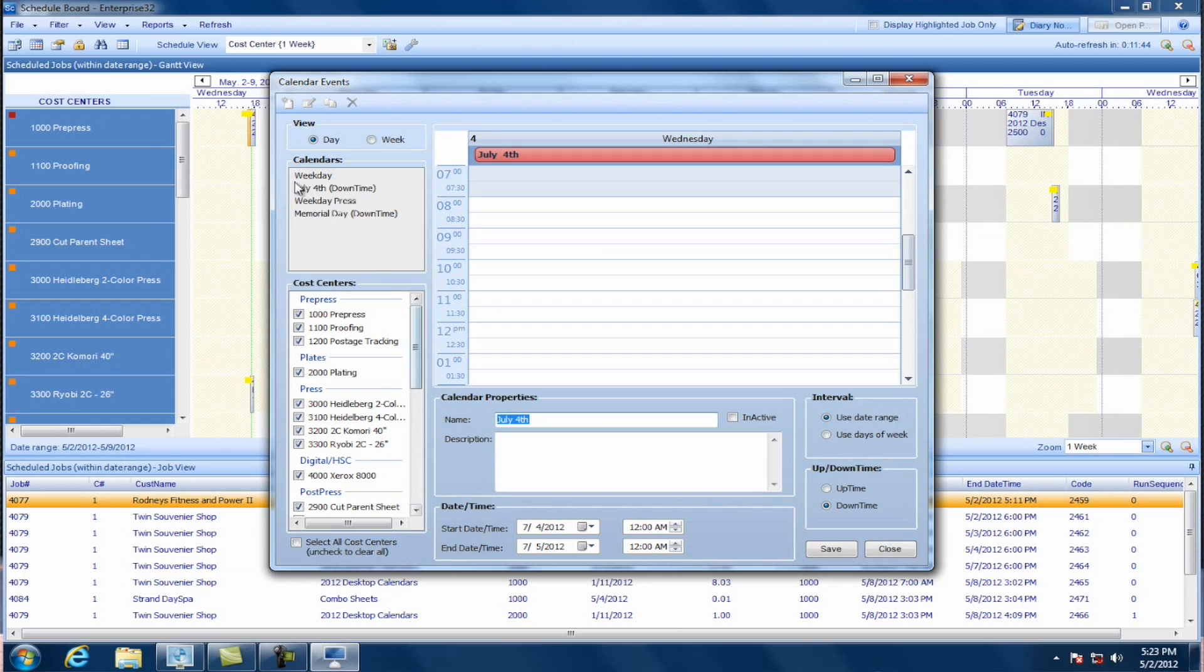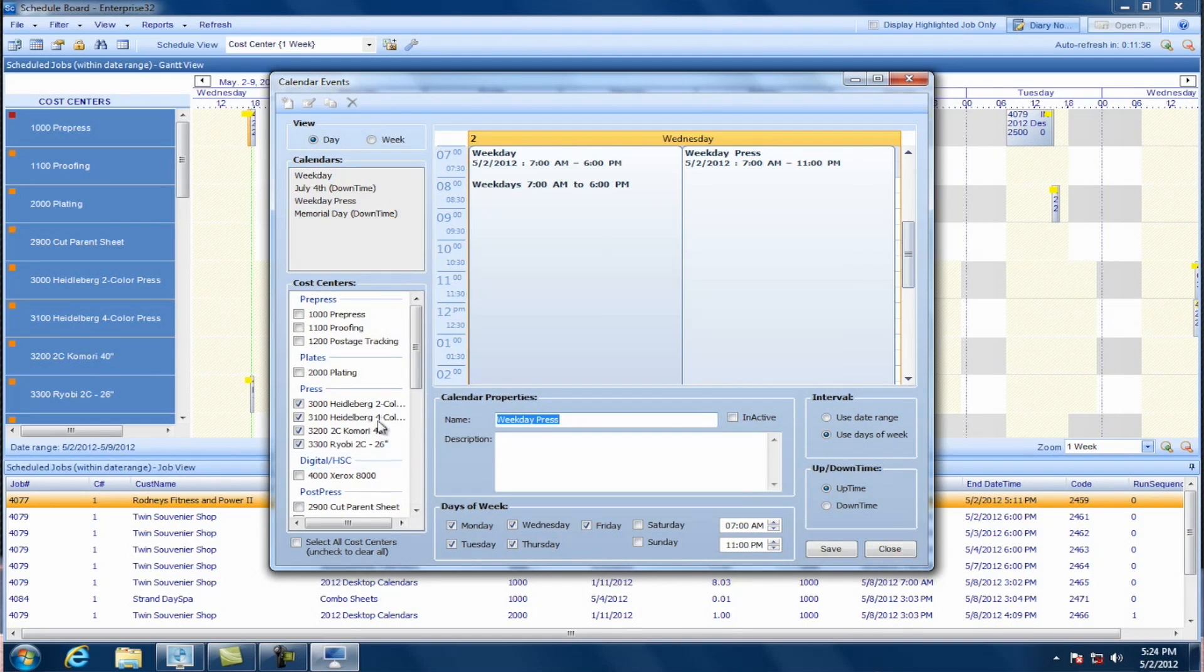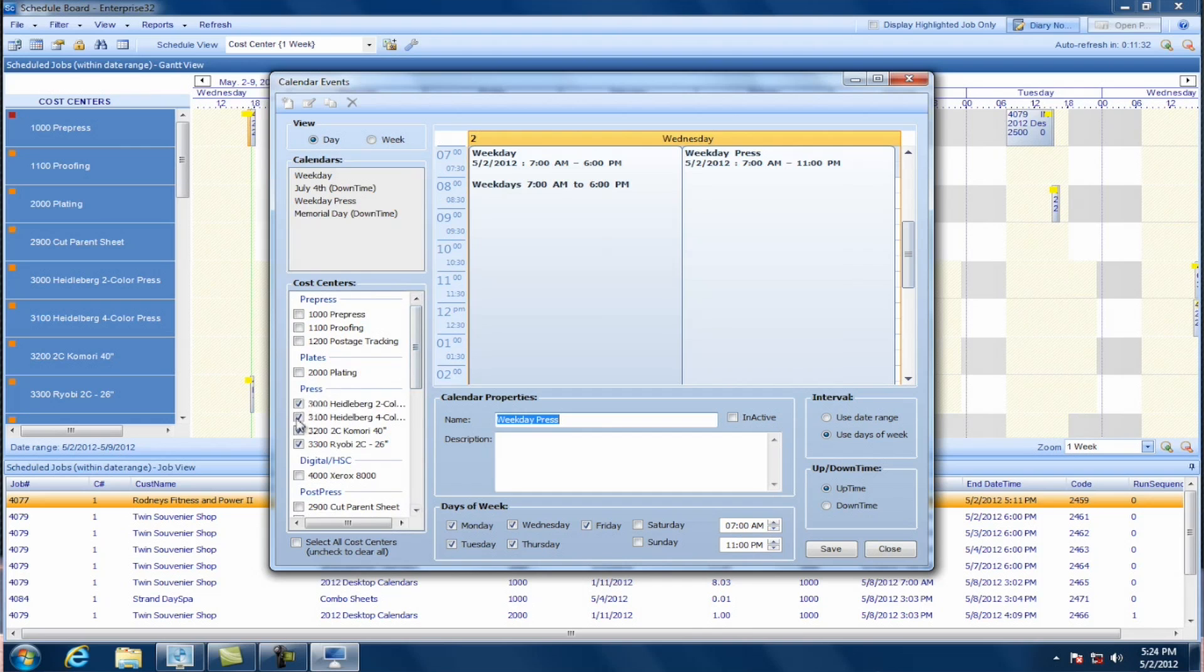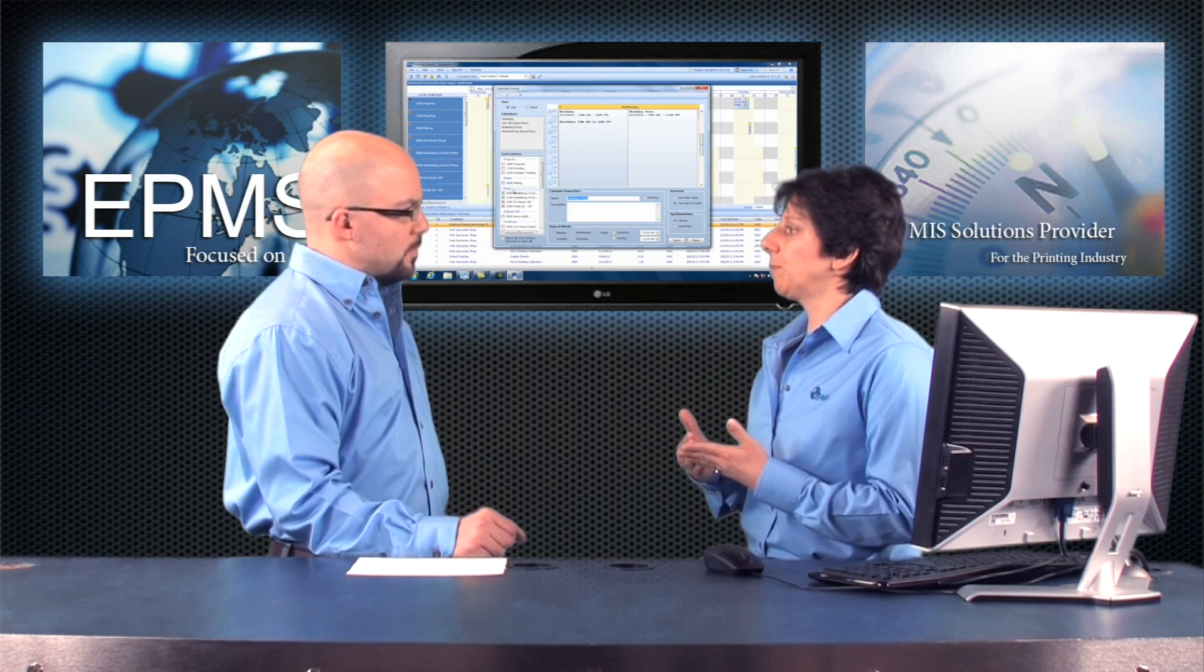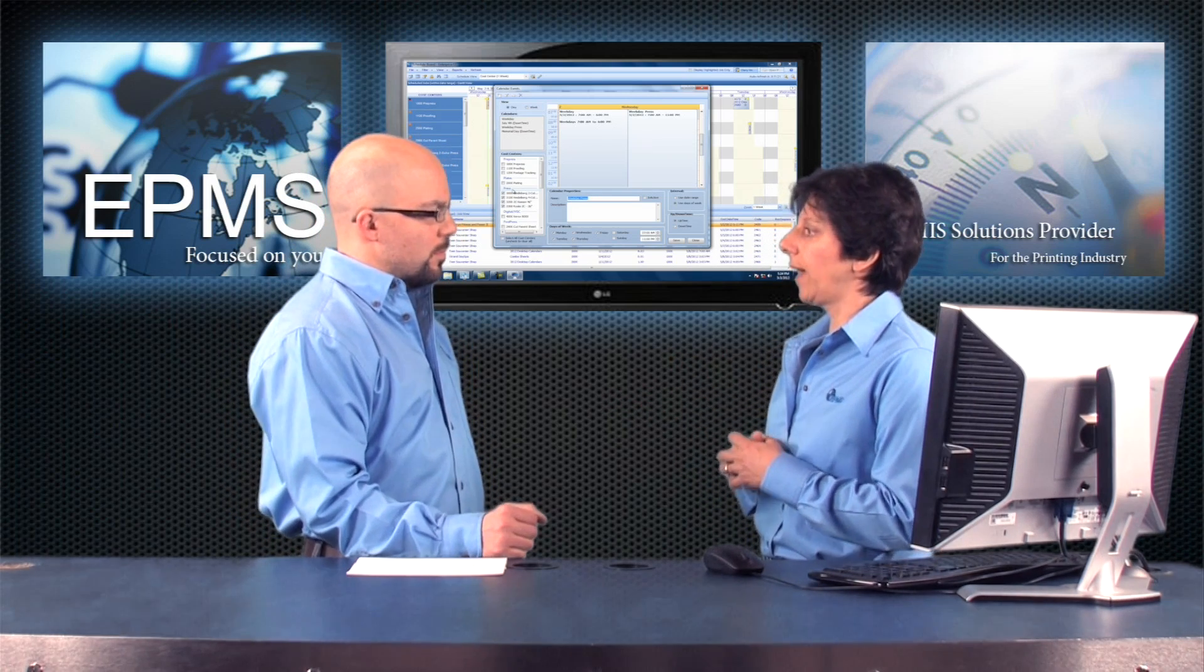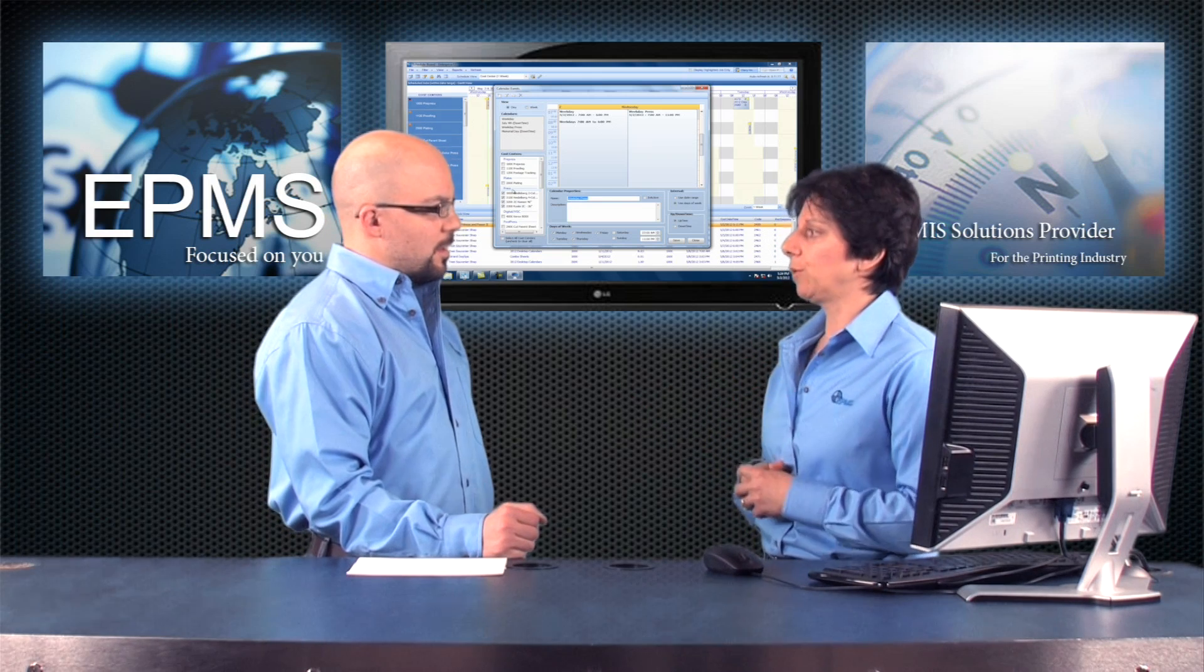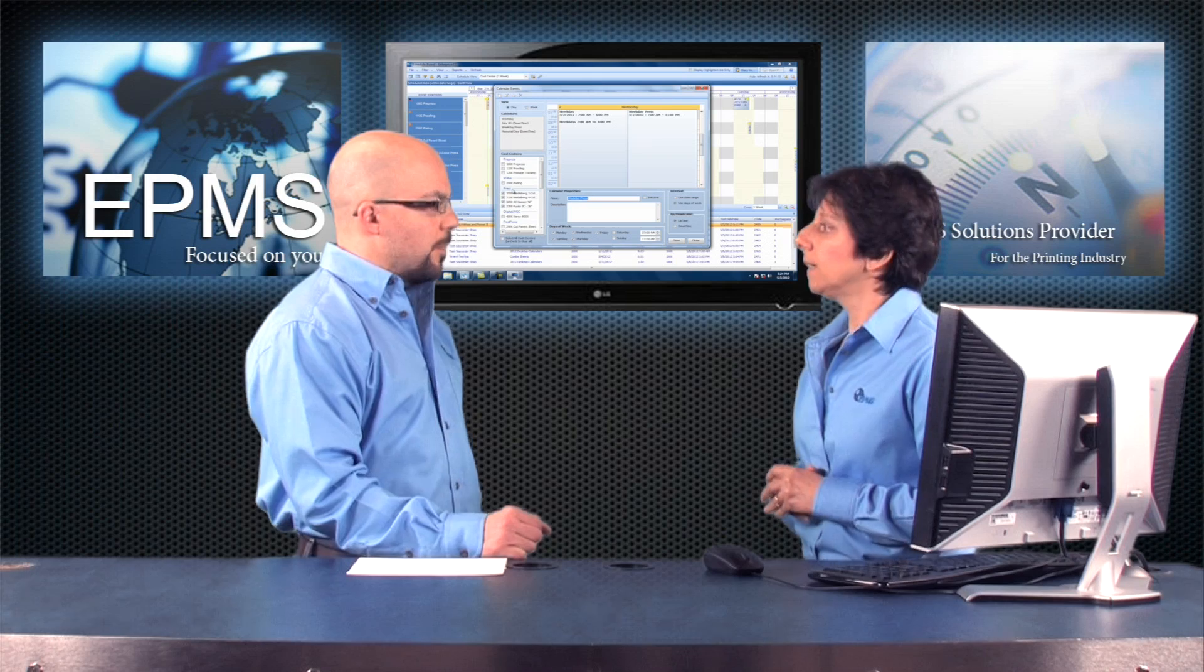Okay. Now one other calendar I can take a look at is my weekday press calendar. If I edit that, in this case, I only have, as you can see, everything is unchecked except for the press cost centers. Because in this case, that calendar is going to be used because my pressmen work a double shift. So in this case, I can have that calendar set from 7 in the morning until 11 at night. Okay. Whereas the other calendar is only until 6 at night.